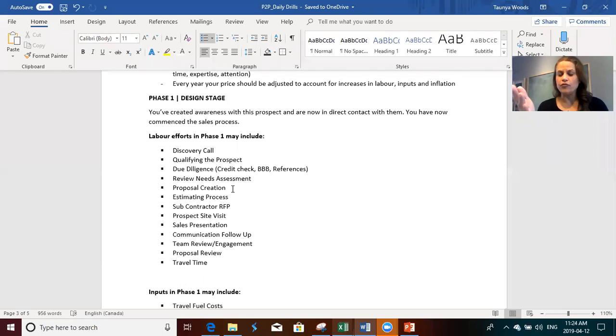I know for Sherry, in your case in particular, especially when it's business to business and these huge contract values, sometimes we can invest a week to 2 weeks simply on the estimating process and the proposal writing process without even being assured that we're going to get the business. So we need to account for that. One of the tools that is going to come in handy for you here is if you have any copies of previous estimates, that is going to be very helpful.